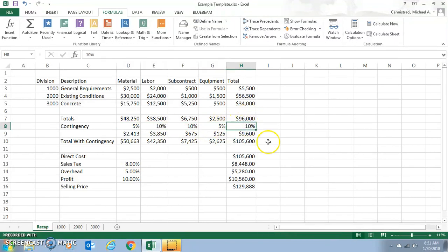Right. So we have contingency built in on material, labor, and so on. We have a contingency on the project total, if you want to do it that way. So this extra contingency here, the way you would have to do this, if you're going to do contingency on the individual project components, you probably would not do contingency on the project as a whole. You could put on 10% on all of these.